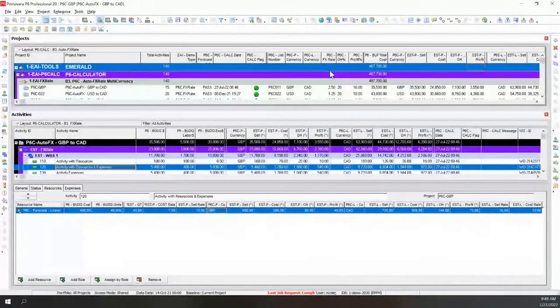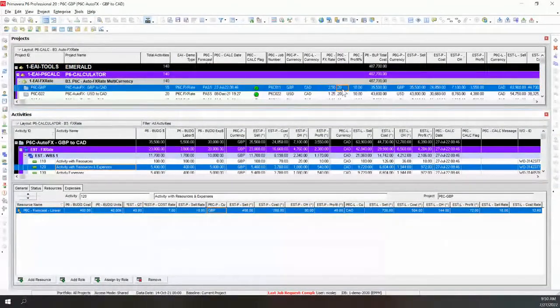for many, many of our clients that want costing or full-time equivalents or other calculations that you want to do in P6. So if I changed the overhead and profit number here to 30%, changed this to 1.5, changed this to 25, whatever we want to do, I can save this and rerun it, and it'll make all the calculations at the lowest level and then roll them back up.